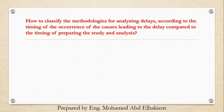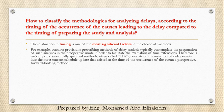How to classify the methodologies for analyzing delays? According to the timing of the occurrence of the causes leading to the delay compared to the timing of preparing the study and analysis. This distinction in timing is one of the most significant factors in the choice of methods. For example, contract provisions prescribing methods of delay analysis typically contemplate the preparation of such analyses in the prospective mode in order to facilitate the evaluation of time extensions.